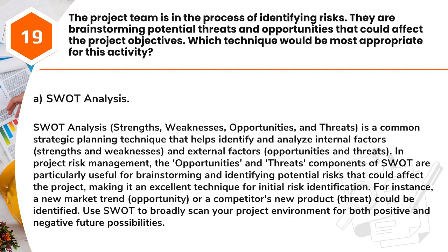In project risk management, the opportunities and threats components of SWOT are particularly useful for brainstorming and identifying potential risks that could affect the project, making it an excellent technique for initial risk identification. For instance, a new market trend, opportunity, or a competitor's new product, threat, could be identified. Use SWOT to broadly scan your project environment for both positive and negative future possibilities.